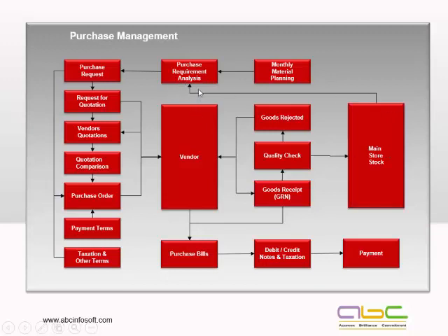I have got all my pending indents which have been raised by various contractors to the store, but which have not yet been issued. Any pending purchase orders, reorder levels. Based on this, the system will automatically give you the requirement analysis. What is the material quantity of various materials required to perform the works smoothly and efficiently. From this, I can go for the purchase request.